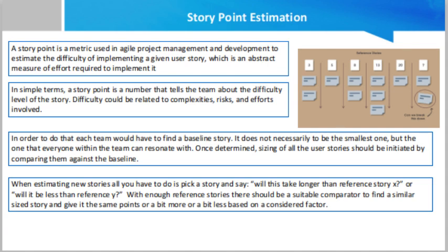Story point estimation, a kind of relative estimation, is typically performed at the product backlog grooming sessions, and the product backlog is evaluated by the team who is responsible for the actual development and testing work. In order to make the sprint planning more efficient in practice, the product owner and the team will make a rough estimation called product backlog grooming before the sprint planning and check if the sprint plan is ready to be conducted efficiently. Is there enough information to complete these matters? Is the user story split reasonably?